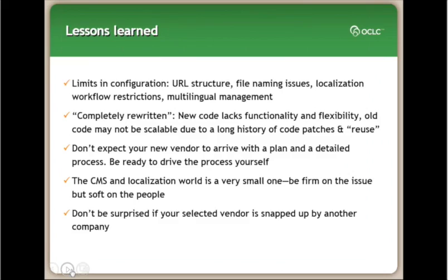Now, the lessons we learned as we went through the CMS selection process was that there are limits in configuration. You're never going to find a system that is absolutely perfect. And a lot of the time, no matter how many demos you have, no matter how many calls you make to ask questions, once you sign the contract, once you get the software, you're going to face some surprises. And you just need to be flexible and figure out how to make things work to your advantage.